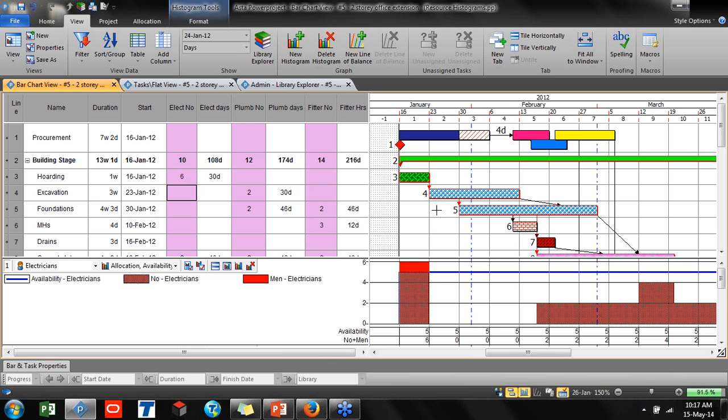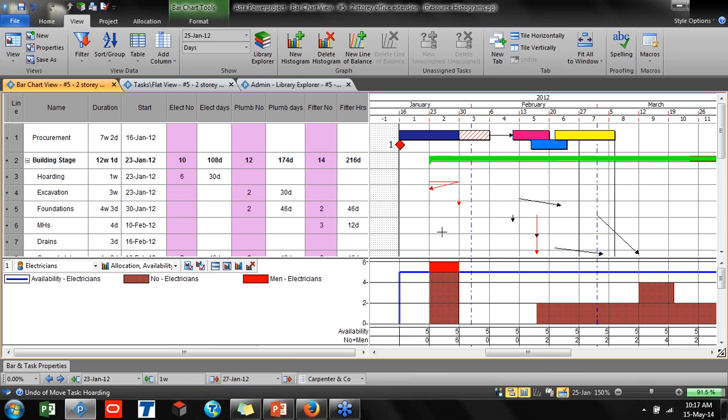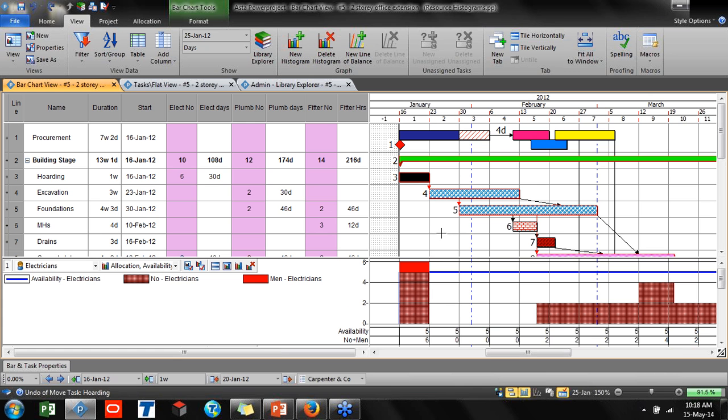And when you would like to analyze, for example, if you start this activity later on, let's say that there is some delay and you would like to start on the next day, as you see, the histogram also will be moved. And if you are using any other project management system, you can be aware of this kind of histograms, and I will be showing more advanced.